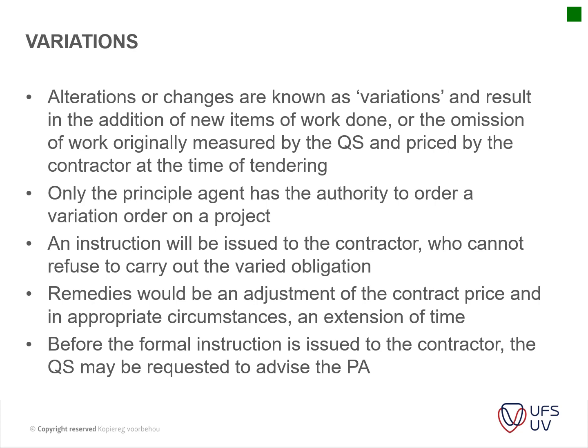Okay, then before the formal instruction is issued to the contractor, the QS may be requested to advise the principal agent. So the principal agent usually works through the QS or through the engineers, or whoever constitutes or instructs that a change should be made. For instance, a structural engineer might say, okay, but the soil isn't conducive for only a non-reinforced strip footing, so let's place some reinforcement in it, and that would result in a variation taking place.